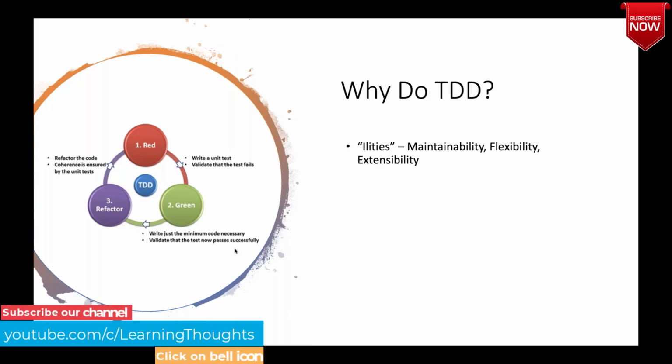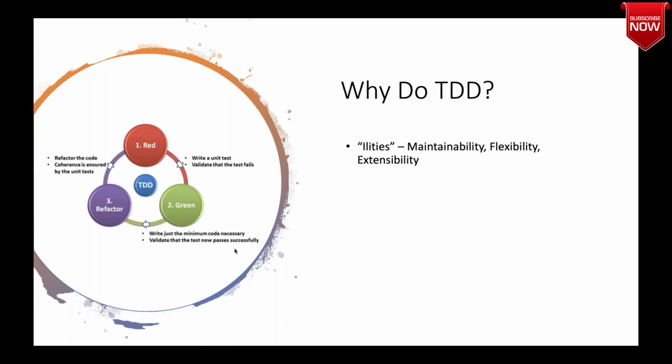Yeah, even then, if you want to do that, testers can take 5 days, and the development can take 5 days, and they can test it. And in general terminology, to be very honest with you guys, testers will be testing 5 stories on the last day of the sprint. But for each and every story, testers will be considering 2 points. 2 points is nothing but 16 hours of his time. But he can validate a story within 2 hours.